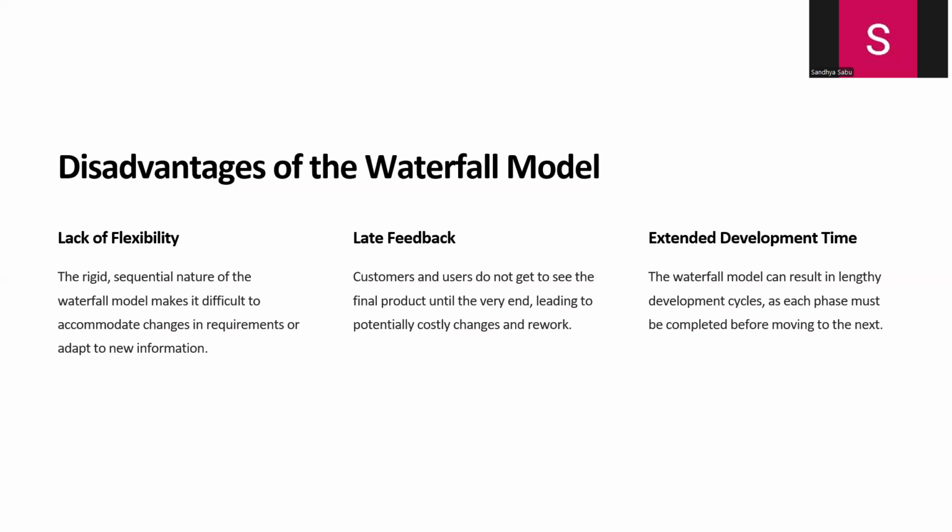Next one is late defect detection. In the waterfall model, testing is done towards the end of the development process. So once the design and everything is done, if we find any defect, it will be complex for us to fix it. Next one is lengthy development cycle. The waterfall model is considered lengthy because each phase must be completed before moving on to the next one. This can result in delays and increased cost if requirements change or new issues arise.